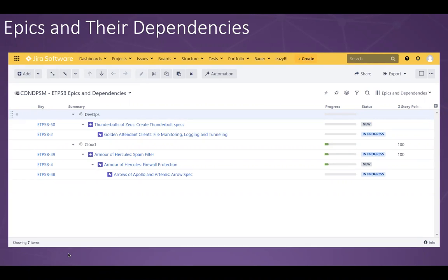I wanted to say how are epics dependent on each other and how are stories and tasks dependent on each other. This first view is just about the epics. Now, epics are especially thought of as being dependent on each other if you're doing SAFe, you're doing program increment planning, you're using those red pieces of yarn, you could connect together features, which map to epics often in Jira in most instances I've seen.